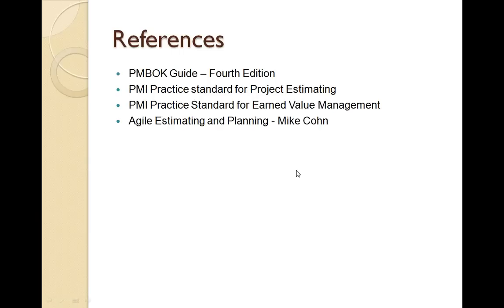In general, the recommendation is that we should not try to do padding at the individual work item level, because then the project estimates get inflated to a significant extent. So the recommendation is you should have your task level estimations, and you can apply the risk factor, and based on the risk factor you can have an extra buffer or padding that gets added to the project. But the usual recommendation is not to add the padding at each and every task level, because in that case it might be an overly bloated number which may not be realistic.